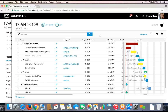There's also a company calendar in Workamajig. That calendar allows us to not only let the entire company know about meetings, but it's also a place where we can put any company recognized holidays. So if we're planning on having offices closed for Memorial Day, Independence Day, or any other variable holidays throughout the year, we'd want to put those on the company calendar well in advance so that all projects will recognize those as non-working days and naturally skip over them for project planning purposes.